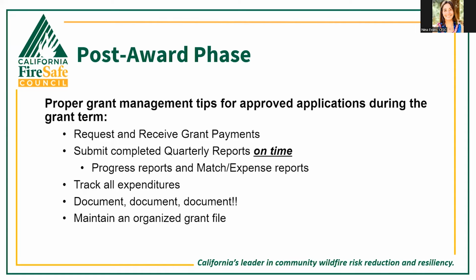CFFC uses this data to compile periodic reports to our funding agencies, like the graphic Julia showed you earlier with the zip codes we had previously collected. So be sure to check and double check reports. And an important thing to highlight is that all reports must be submitted to CFFC by their deadlines, and any failure to meet these reporting requirements may lead to withholding of any future grant payments during the post-award phase.